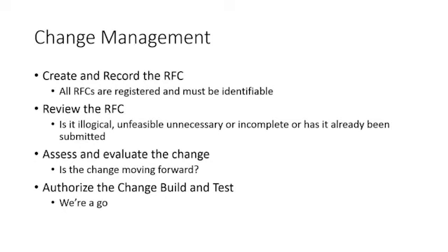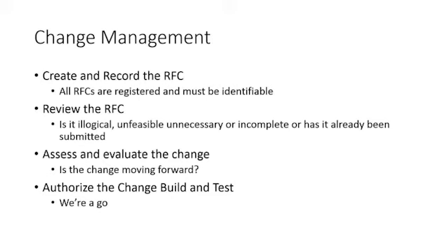So in change management, we want to create and record the request for change, the RFC. Make sure they're registered, make sure we can identify them. Because if we have to go back and say, oh, well, there it is, we created it, we recorded it, all about the documentation, have to document what's going on. We can see where that change was, who asked for that change, date, time stamps, things like that. Review the RFC. Is it still logical?